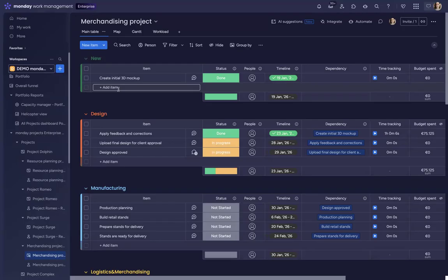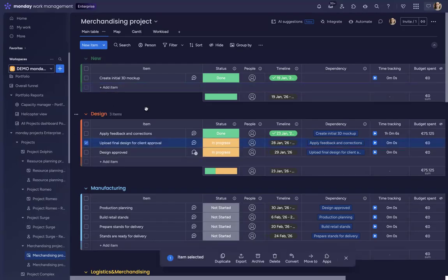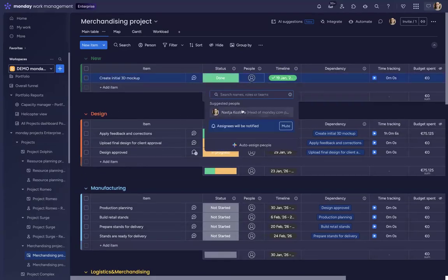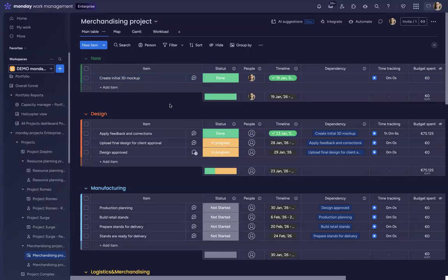you create the project schedule out of the according template, this template can be adjusted to the single project. So you can either add some tasks or delete some tasks. And as soon as the project schedule is ready, those tasks can be assigned to people who will work on them. Those people will be able to see all their tasks in one place, which is called My Work.